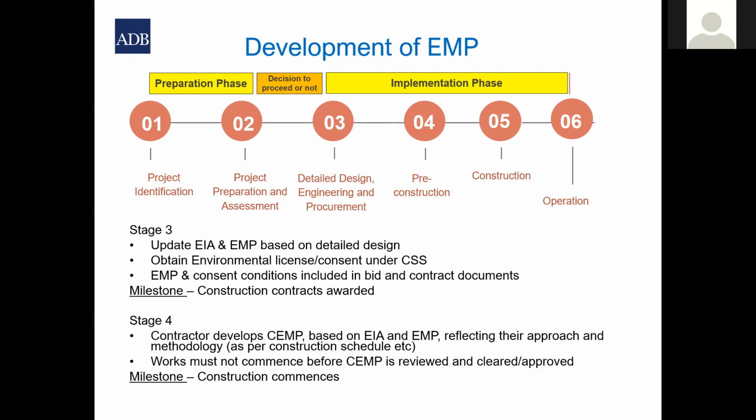And a key point in the pre-construction phase is that the works must not commence before the Construction Environmental Management Plan is reviewed and cleared. It's a very important point, and we'll be emphasizing that as we go through. So the milestone for the end of stage 4 is the commencement of construction.